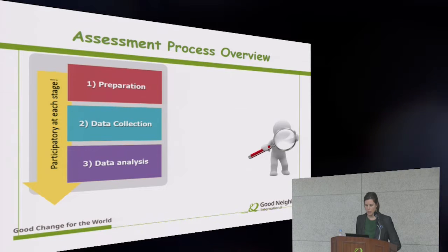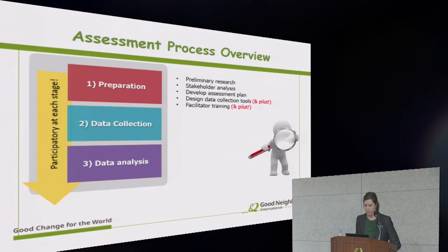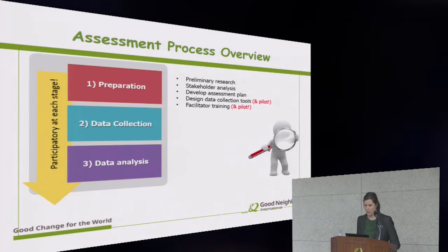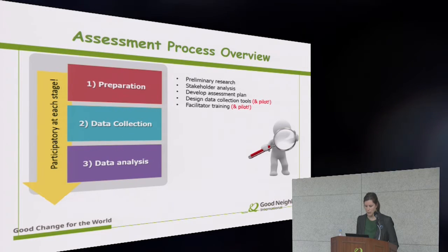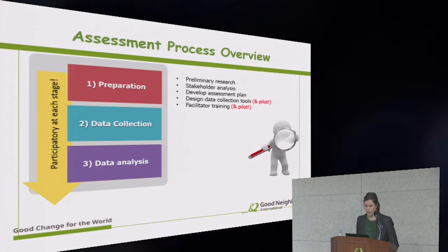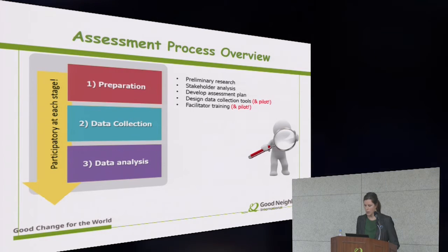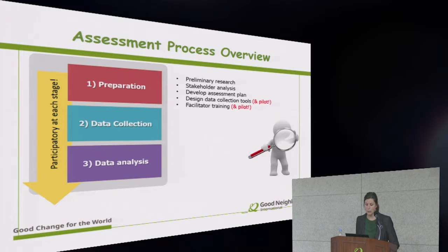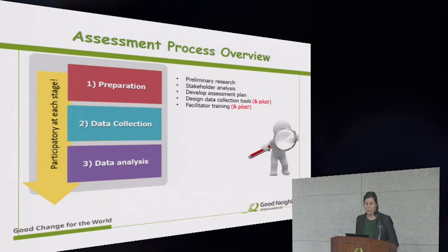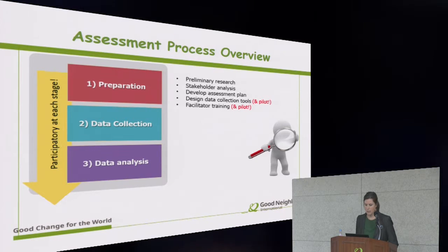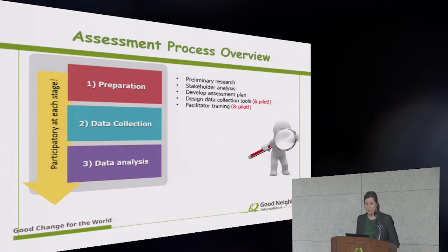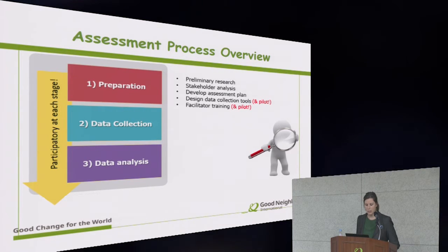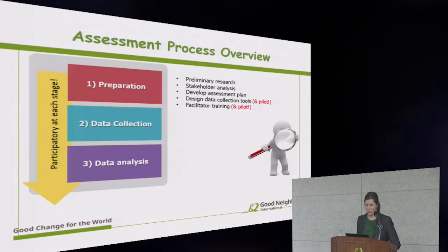So first is preparation. And this is an important time. It's important that proper time and consideration are allocated to this important stage in the planning of your assessment. So the preparation stage will involve some preliminary research, both secondary and primary data collection. It'll involve a stakeholder analysis. It'll involve designing your data collection tools and piloting those tools, and also training facilitators and enumerators.